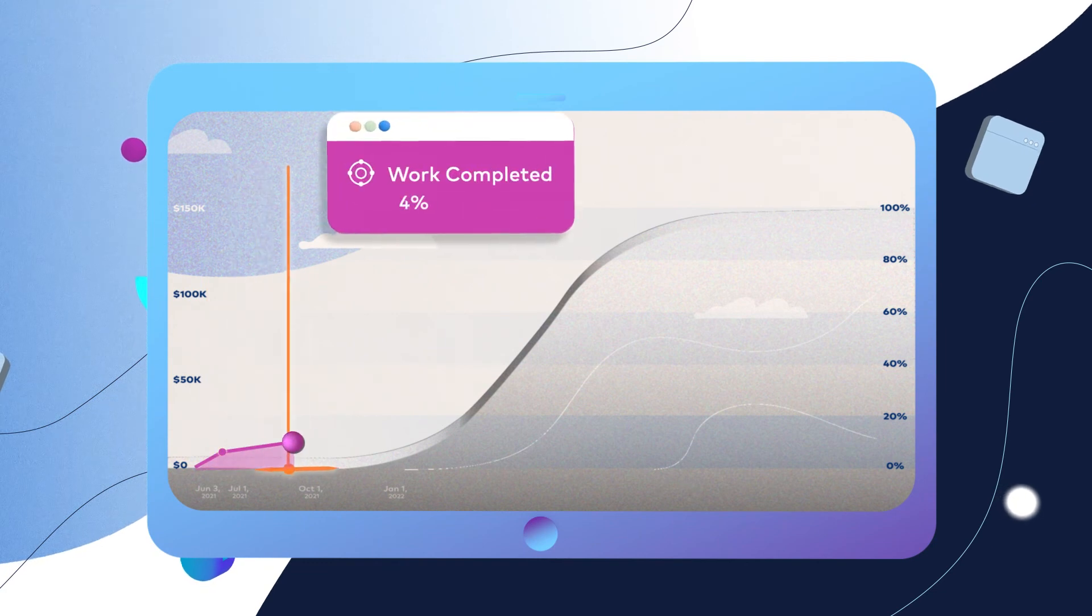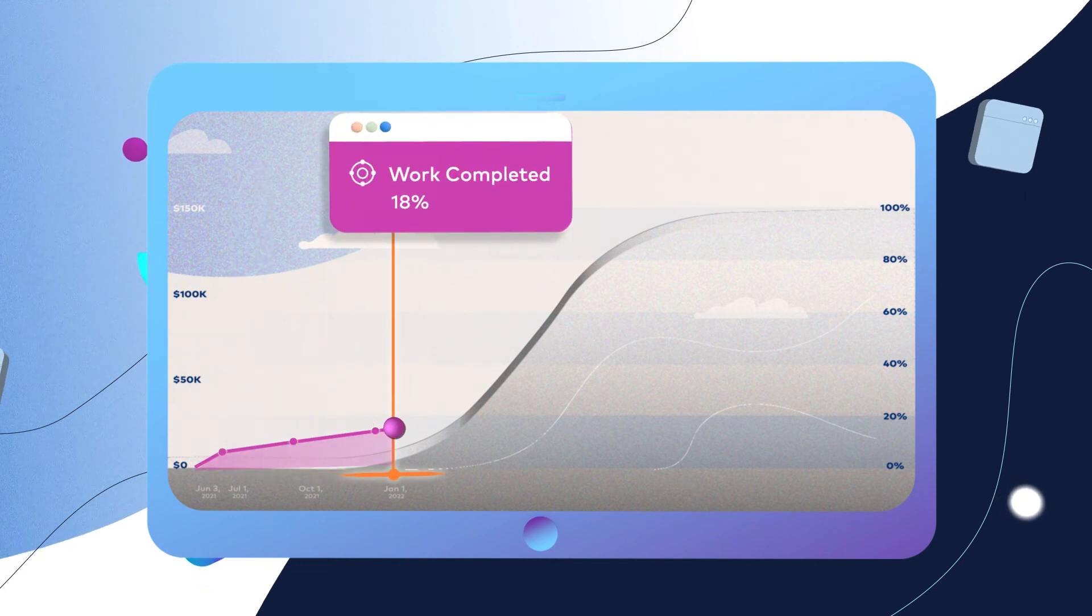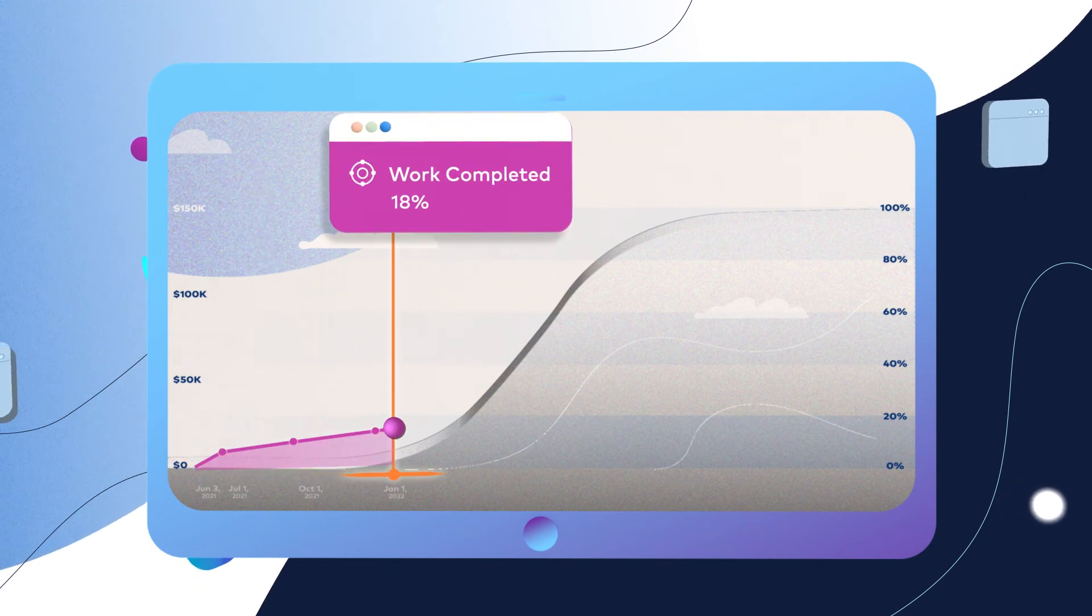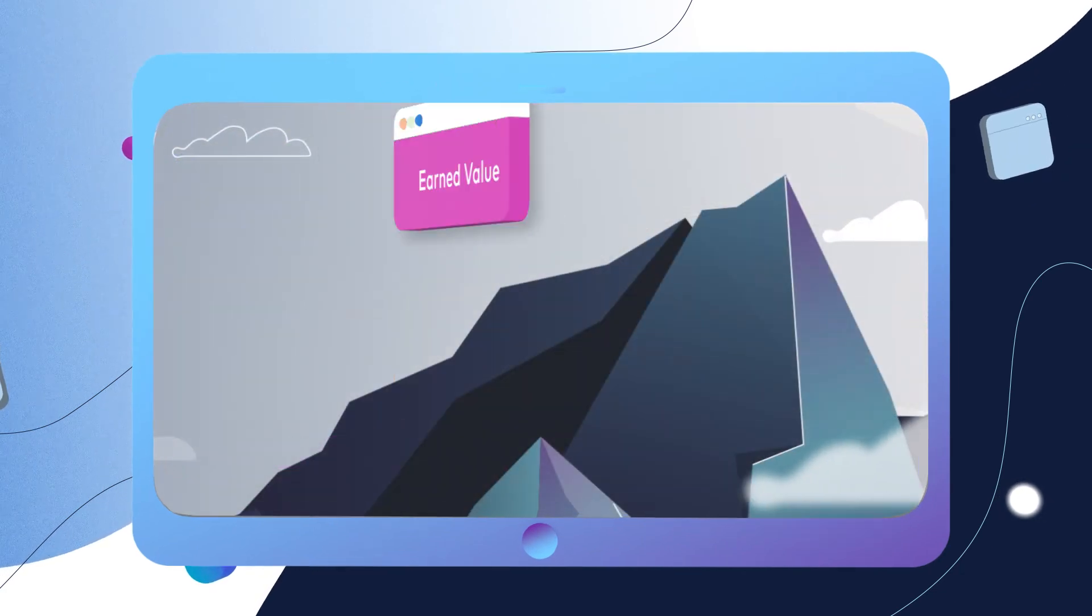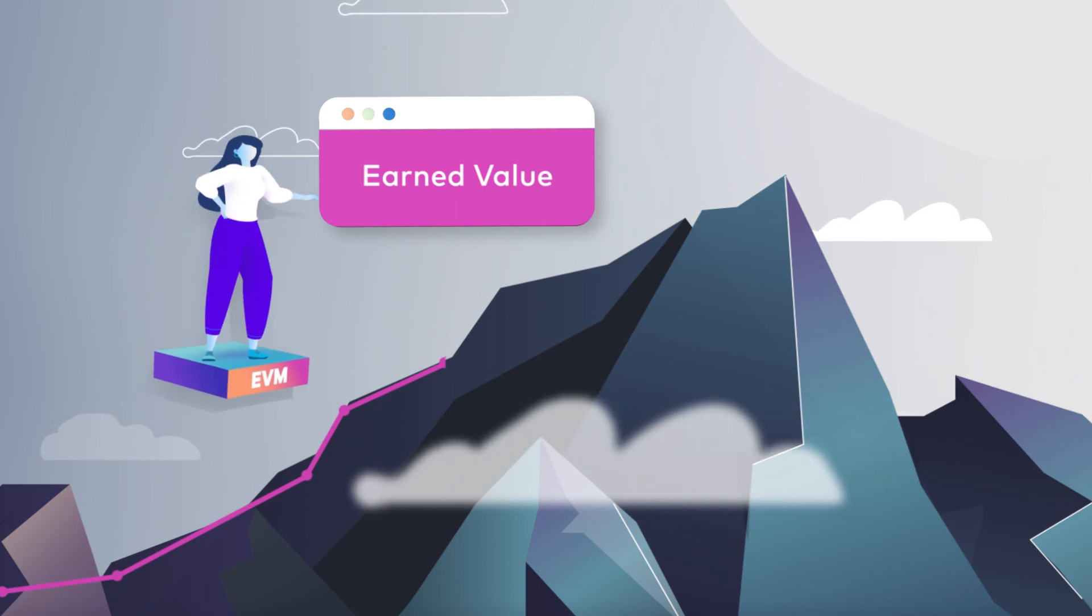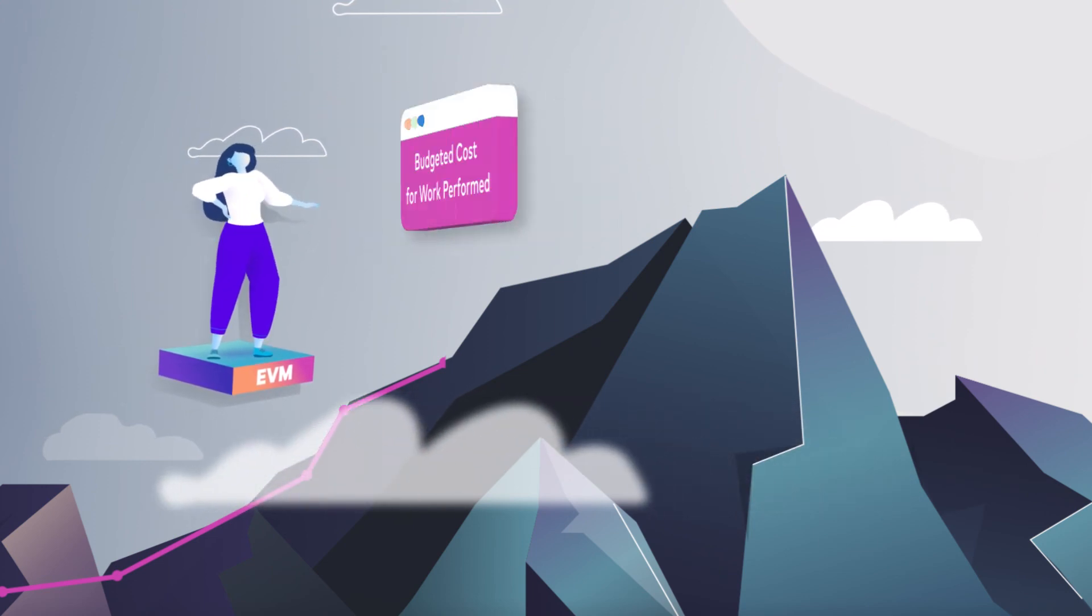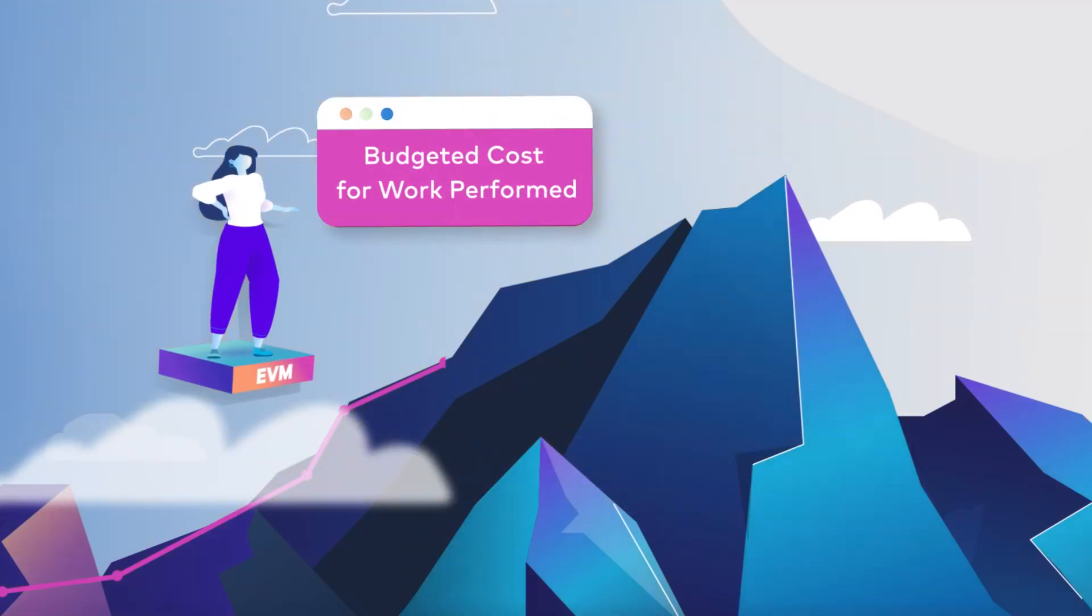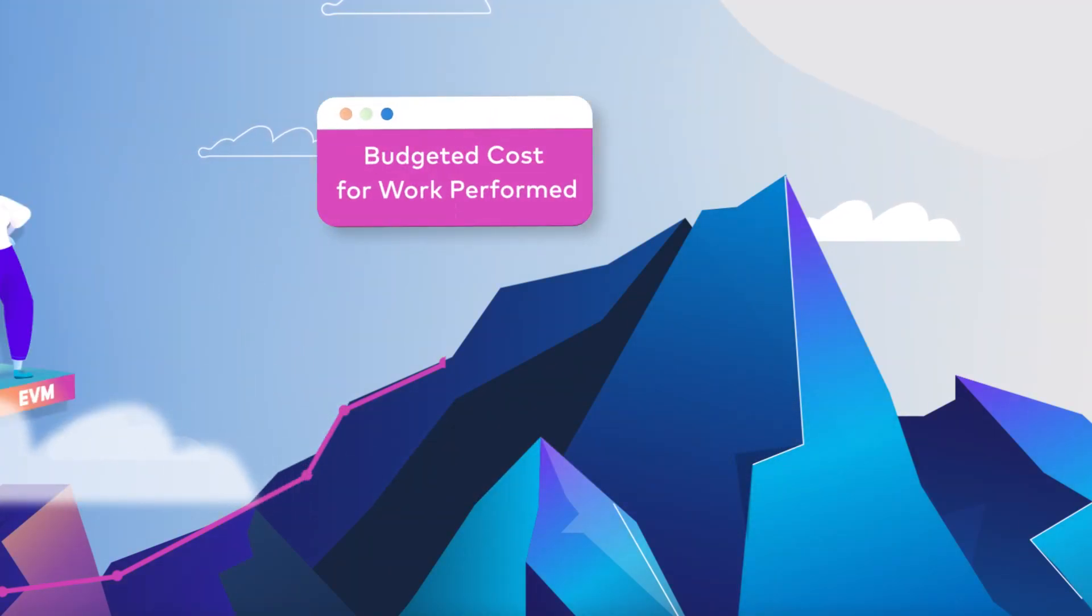The work completed line shows how much work you've actually completed. It's officially called earned value or budgeted cost for work performed.